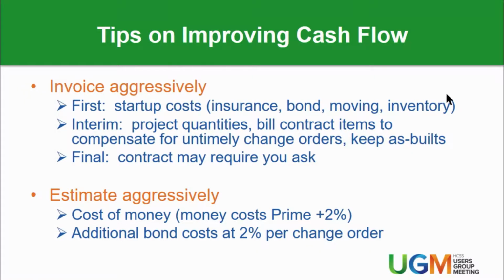On a final billing, the contract may require that you actually ask for the final payment. I've had my final payment held up by the fact that, well, you never asked for it. Well, didn't you think I wanted it? You never asked, and that's what the contract says. So don't forget to ask when it's time, when you reach whatever level of completion is necessary to get your final payment. Estimate aggressively. Cost of money.